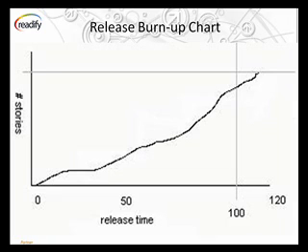Alternatively, you can look at it a different way and have a burn-up chart. So how much functionality have we completed towards our end goal, if our end goal is a bit clearer. Each time we add scope, we push the line up. If we keep time the same, you know how much we're going to miss by, so we have to keep pushing time out. So if we increase scope, we need to take something out if we're going to keep this end point the same. Make sense? So that's kind of the project management aspects of it. We touched on it very briefly, even though no one asked, except Wendy.